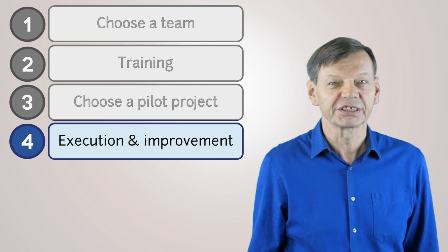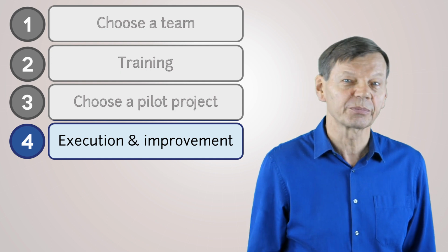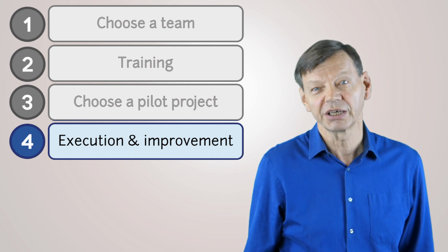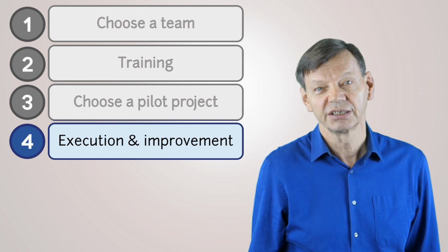Working on a pilot project enables you to obtain results fairly quickly. It allows you to quantify the differences between other projects that are not managed the critical chain way, while limiting the team's apprehension towards this new work methodology.